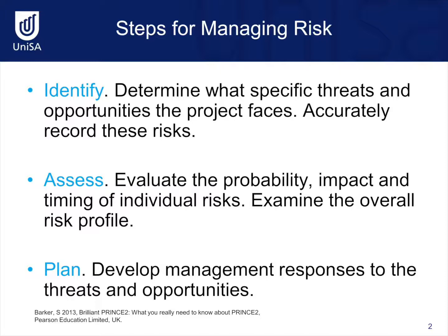When identifying risks, we determine what specific threats and opportunities the project may be faced with and accurately record those risks. When assessing risks, we evaluate the probability, impact, and timing of each individual risk, and then examine the overall risk profile for the project. This can provide a snapshot of how risky the project may or may not be. When planning risks, we develop management responses to the threats and opportunities because there must be a way to deal with each risk that has been identified in the event it should occur.